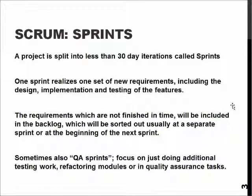Of course, this doesn't always work. We have up to 30 days for each iteration to realize one set of requirements, and that includes all the design, implementation, testing, quality assurance, and integration work. It's sometimes not enough. So we may end up with backlog, meaning we are unable to fulfill all the requirements during the sprint they were planned for. In most Scrum projects in real life, we also have to do separate sprints for sorting out features we didn't have time to complete or to do additional quality assurance work.